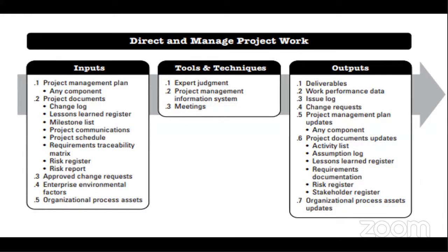So phase one of a project gives a deliverable, which will become an input for the next phase. At the end of the next phase, we'll have another deliverable that will become an input for another phase, such that by the time we get to the final phase, we'll have the final product. And I'm going to give you an example.